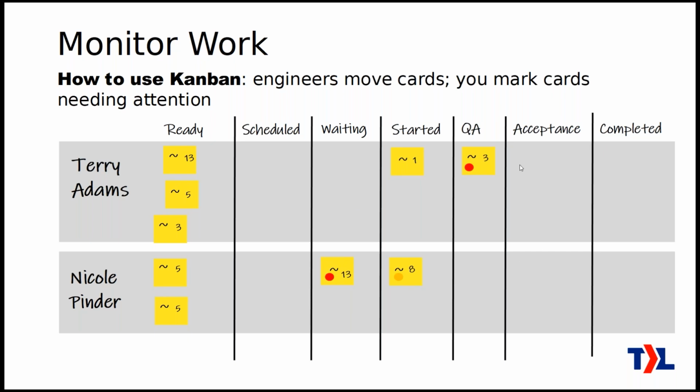As far as the project management goes, you're going to mark the tickets that have some sort of fault. Maybe with a red sticker you could do, or if there's a serious fault, orange could be sort of a keep a closer eye on this, but it's not yet a fault, that sort of thing. So that's how you can be very clear in your team about what's the state of all this work.